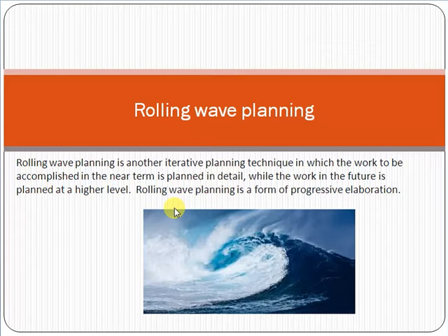Once you reach the production deployment phase, you do the detailed level planning: how many resources are required, how you will do the deployments, and what the schedule will be. So that is called the concept of rolling wave planning, friends. The concept is that for the things which are nearer to you, you do detailed planning, and for the things which are far, which we have to deal with later, you do high level planning.